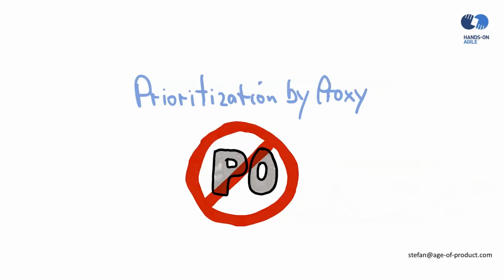The moment you take away the authority from the product owner role, the moment you start to disrespect the product owner role, you actually create a quite neat waterfall, though with significantly shorter feedback loops, thus also mitigating the risk of the original process. I think this is anti-pattern number one. The product owner is actually not a product owner. Someone else is ruling the product backlog.